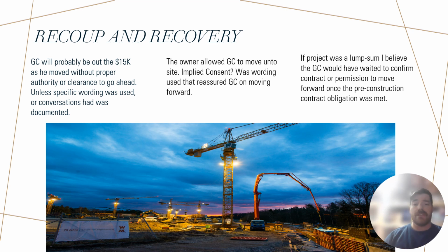So if conversations were had between the GC and the owner, that would kind of imply or set patterns that this was okay, then legally it's kind of a gray area, but the GC would have a case if he wanted to take the owner to court. The other part of this, the owner allowed the GC to move onto the site. Again, he didn't say yes, but he saw that they were there for 2 weeks and never said anything, and that falls deeply into that implied consent, right?